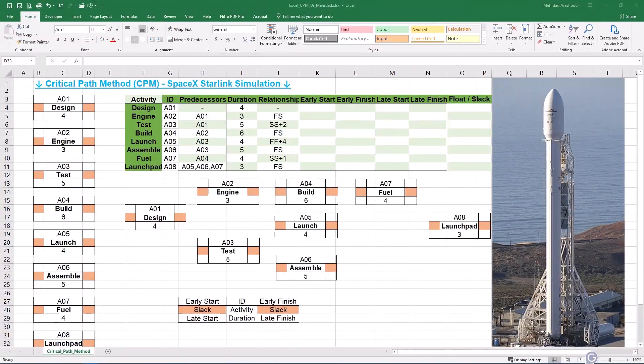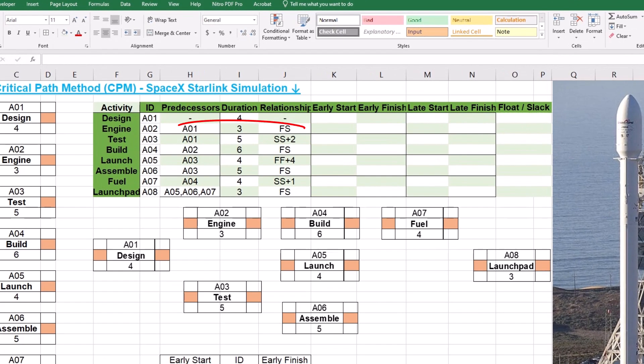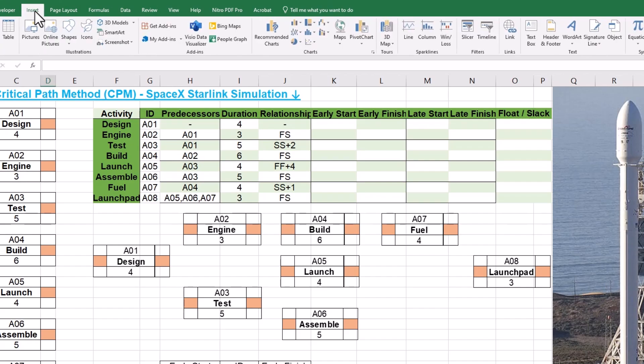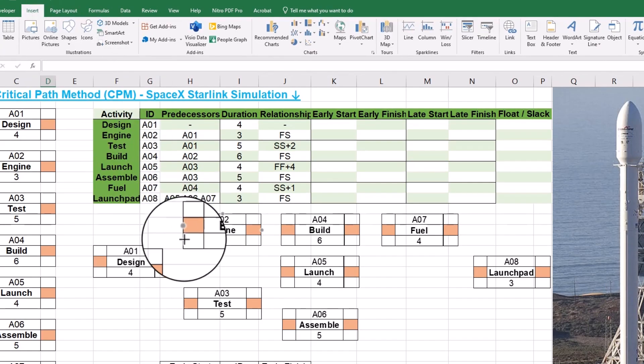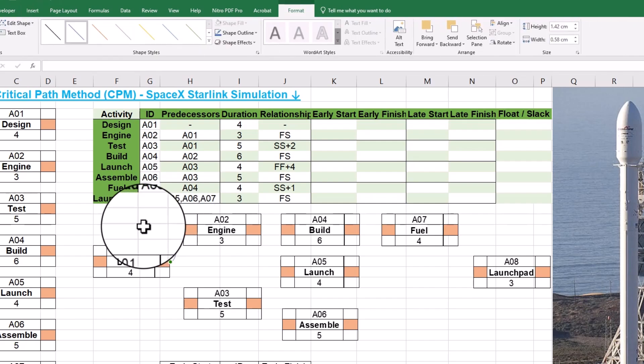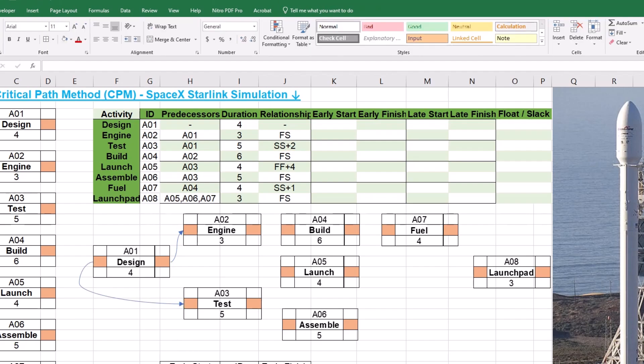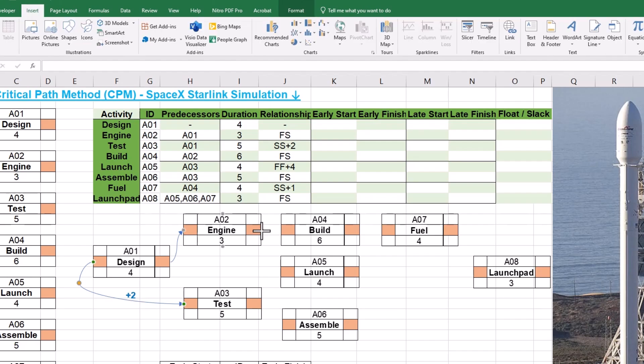Step 2 is drawing dependencies of the project network. Referring to our project data table, we can see that activity A2 has a Finish to Start or FS relationship with A1. To draw the arrow, navigate to Insert tab and Shapes. We can choose either an elbow arrow or a curved arrow to connect the Finish of A1 to the start of A2. The next activity is A3, which is dependent on A1 with a Start to Start or SS relationship and a Lag of 2. We can insert an arrow to connect the Start of A1 to the Start of A3. Feel free to insert a text box to specify a Lag of 2 on the SS relationship.